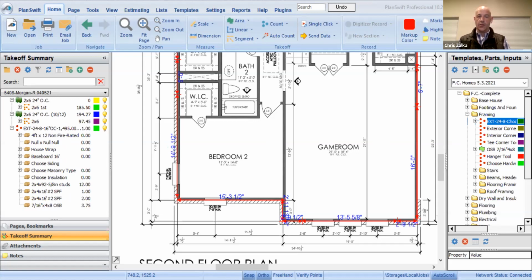They ran all floor joist in one direction, and that's something old school where they say, hey, if we go one way, we're always going to run it one way. But a lot of times it's more cost efficient if you just run it wherever it's more cost efficient, I would say. Yeah, that one we had somewhere about 18 parallels in a garage that wasn't needed. The other one I want Dave to talk a little bit about, it was a builder in upstate New York.